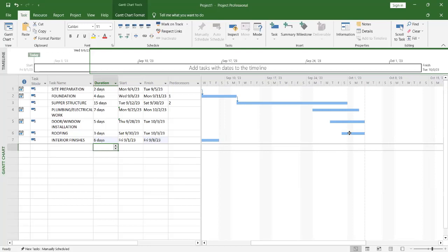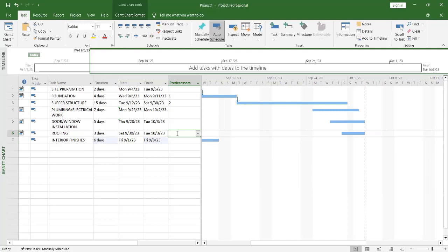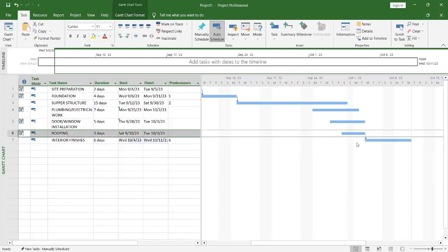So now you see, I'm using the approach of linking. I can use the approach of selecting the two items here, or the two tasks, and use the link here. Or I can use the approach of linking it using the predecessor. All right. So any approach that is easier for you or that you understand, you can use it. So now I've already linked this to this, and it has already input that, okay, item 7 is actually preceding item 6, yes.